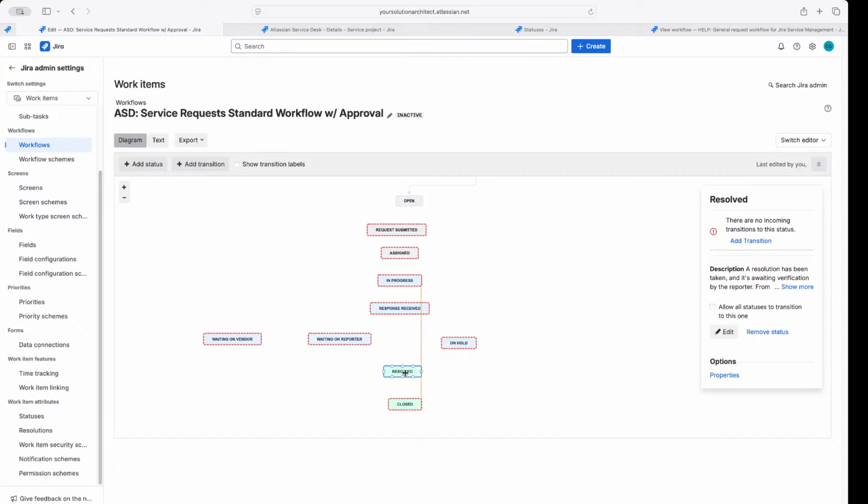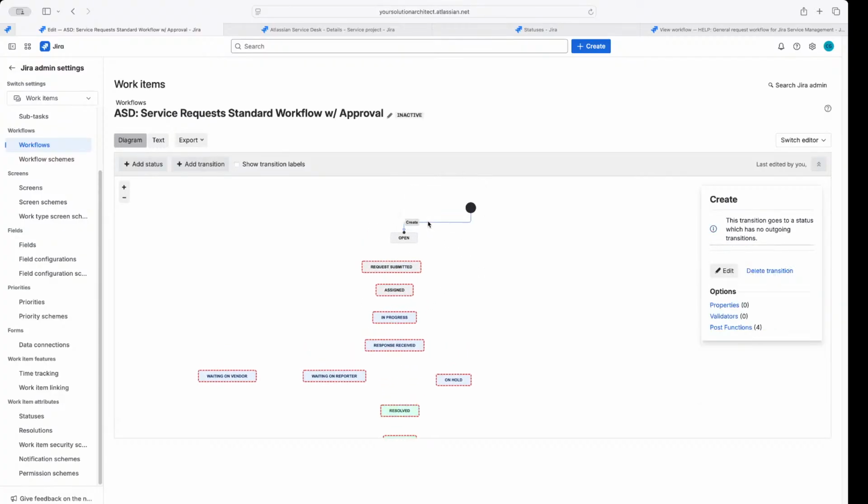In software projects, you see this a lot, where development will be like, we fixed it, we think. QA will go, no, you didn't, and put it back in progress or rework needed. Or they'll close it if they've verified the fix. So you'll see these gates used a lot. If they bother you, totally fine, you can remove that one. They're not necessary, but they are a way to leverage the permission scheme. So I often do include them.